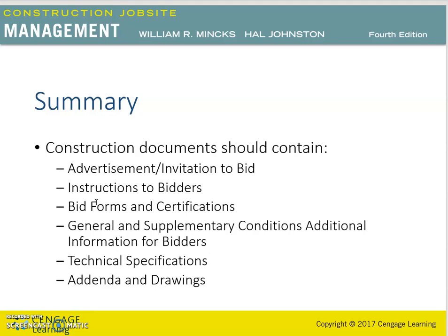Construction documents contain a number of components, for example: the advertisement or invitation to bid, instructions to bidders, bid forms and certifications, general conditions and the construction contract, supplementary conditions of the construction contract, technical specifications, additional information to the bidders, addenda, and the drawings, including the civil, architectural, structural, mechanical, electrical, and other specialty areas.